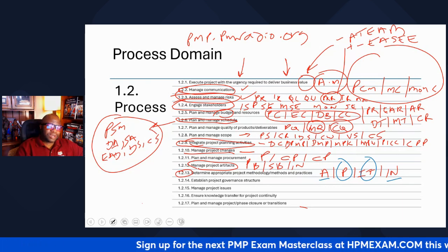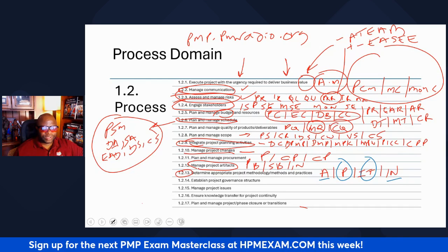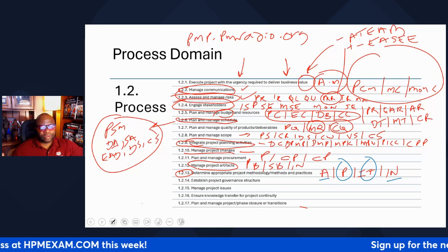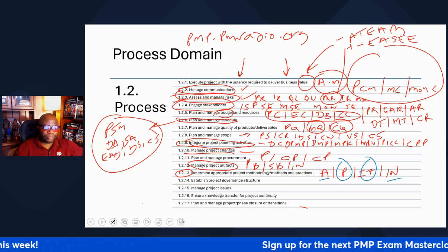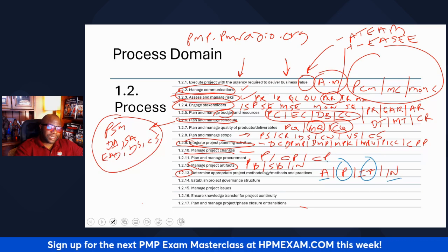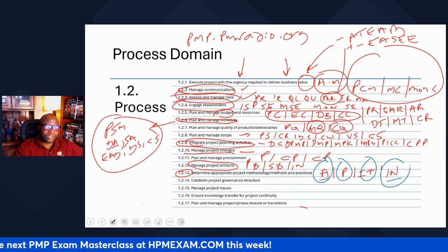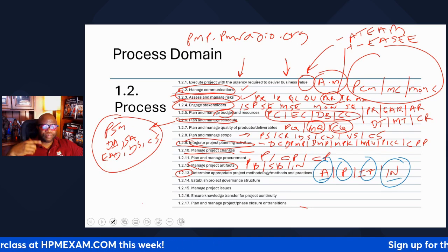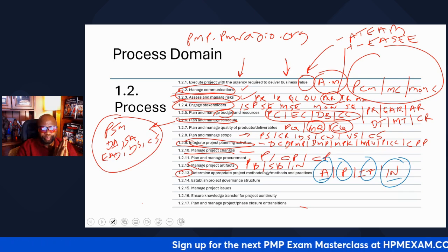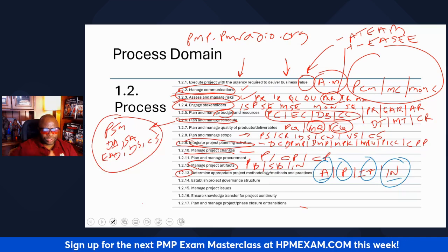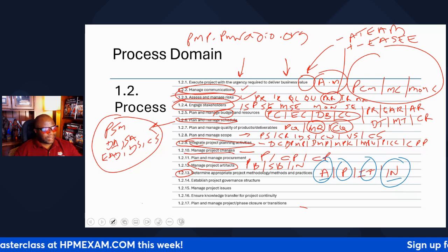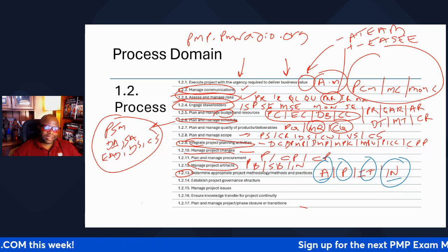You need to understand when to use an agile approach versus an iterative approach. If you are repeating till correct before you deliver, then agile is not for you. If you are repeating till correct and delivering incrementally, then agile is for you. If you are delivering in small batches and doing it once, not repeating things, incremental is for you. It's used for a well defined product. You do the work once and out it goes. You deliver in batches. It could be, I want to deliver 10,000 flasks, or I want to deliver 10,000 mice.